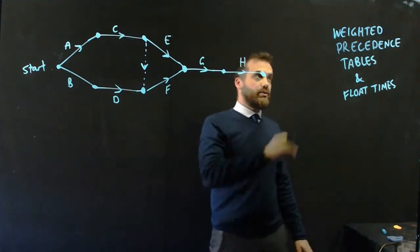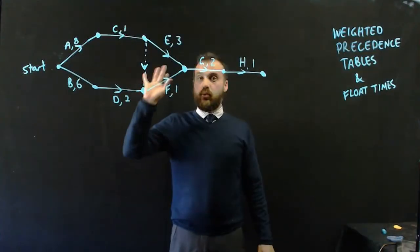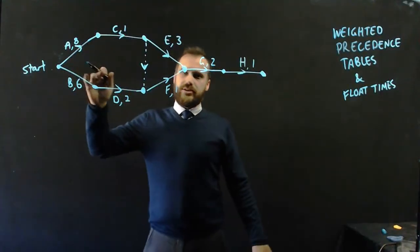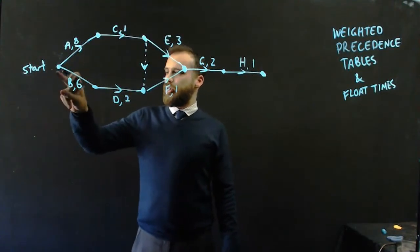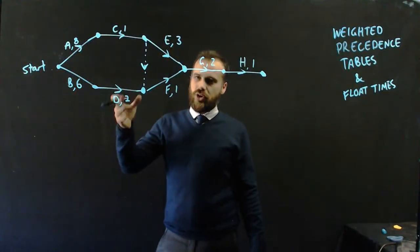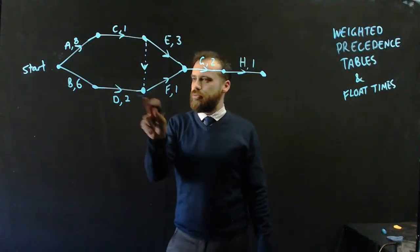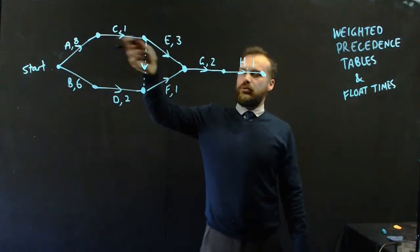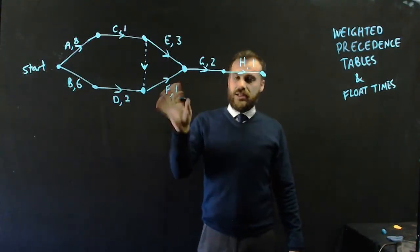Now, I'm going to create what's called a weighted activity network. Now, what does this say? Well, it takes 8 units of time, 8 minutes, 8 hours, whatever it is to do A, but it only takes 6 units of time, 6 minutes, let's go with minutes, to do B. And then it takes 2 minutes to do D, 1 minute to do F, 2 minutes to do G, 3 minutes to do E, and 1 minute to do H. So that's what we mean by a weighted activity network.